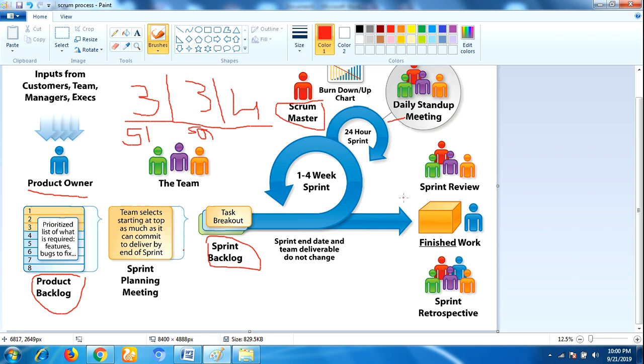After completing the sprint, it will be reviewed by the product owner. Once the product owner accepts, it will move to the production environment. Then this version will go to the customer environment. So that is the first version of the sprint, and again sprint 2. These three requirements will go through the same process only.